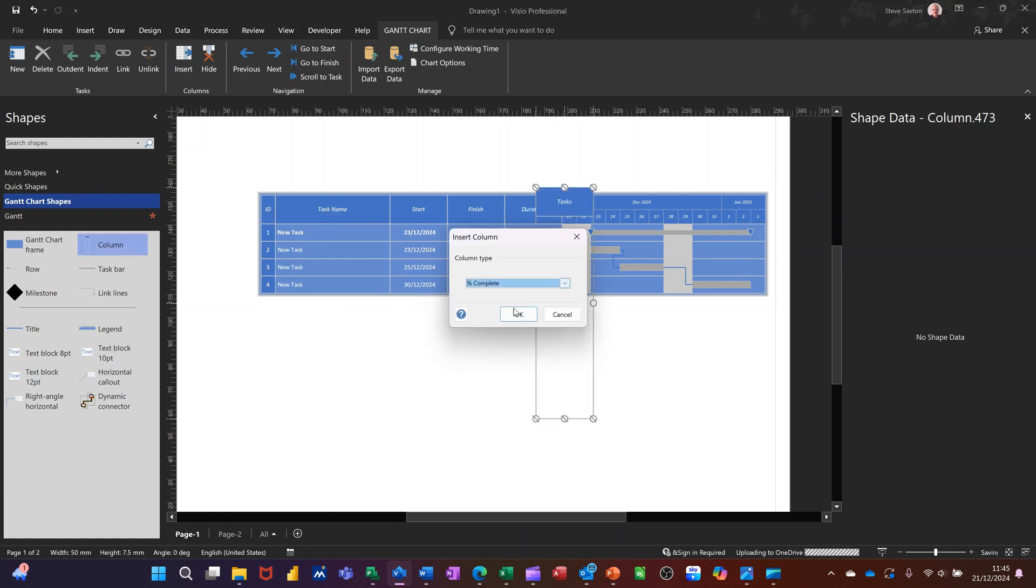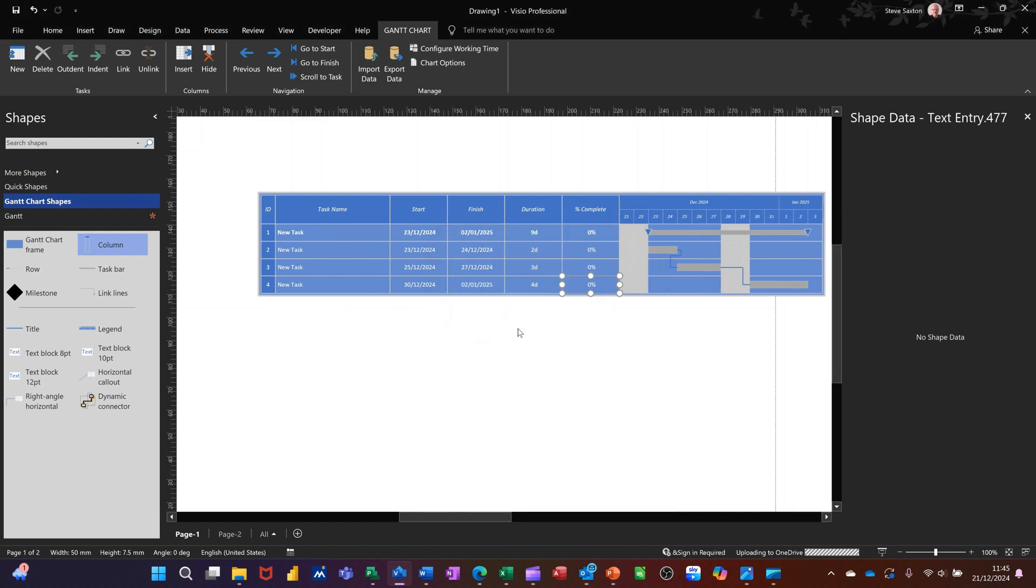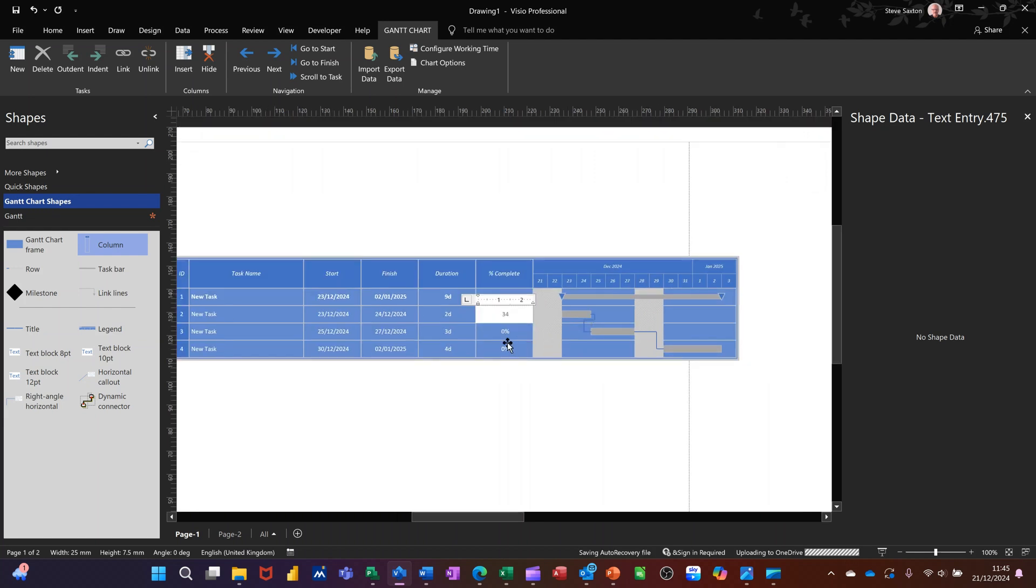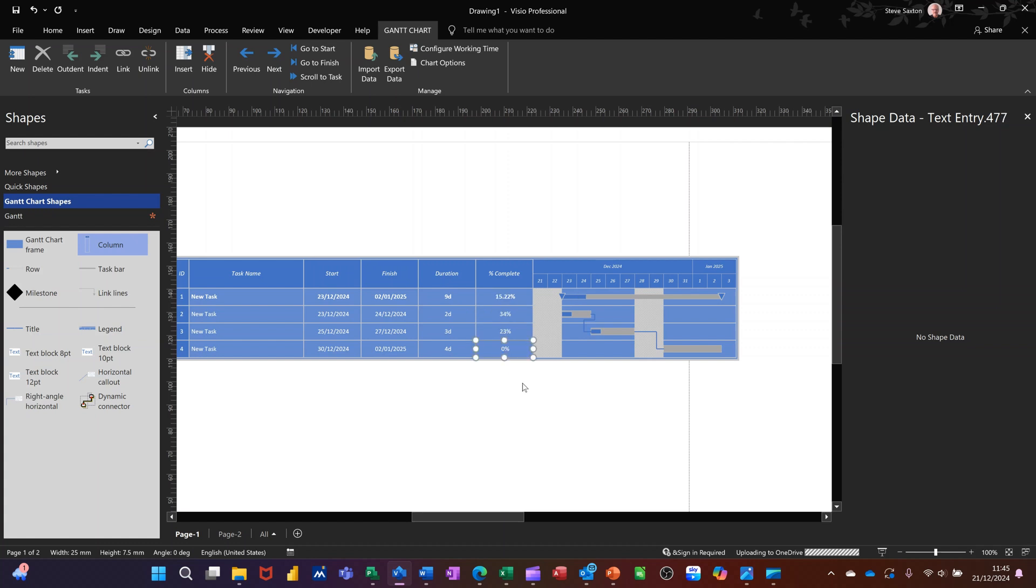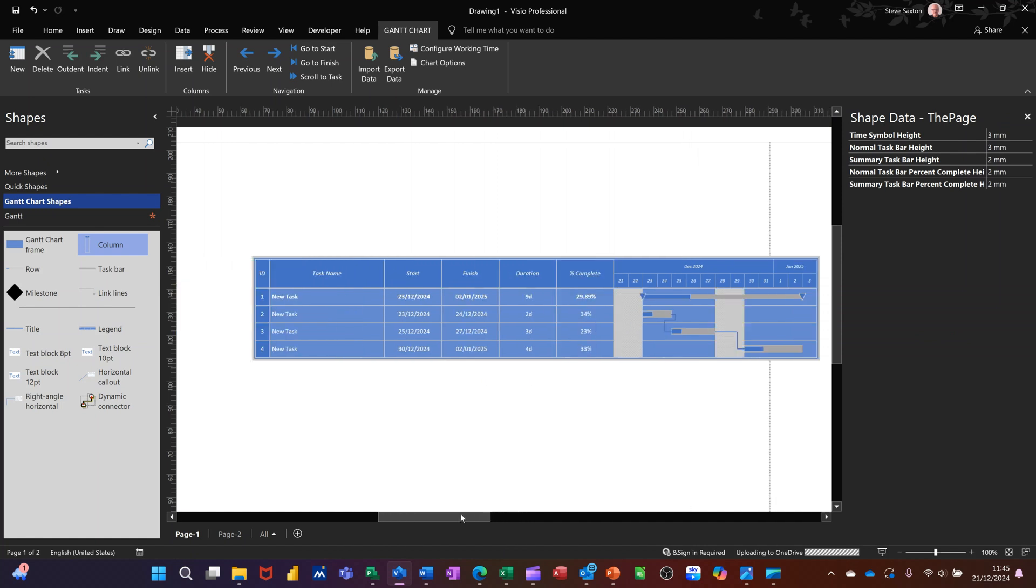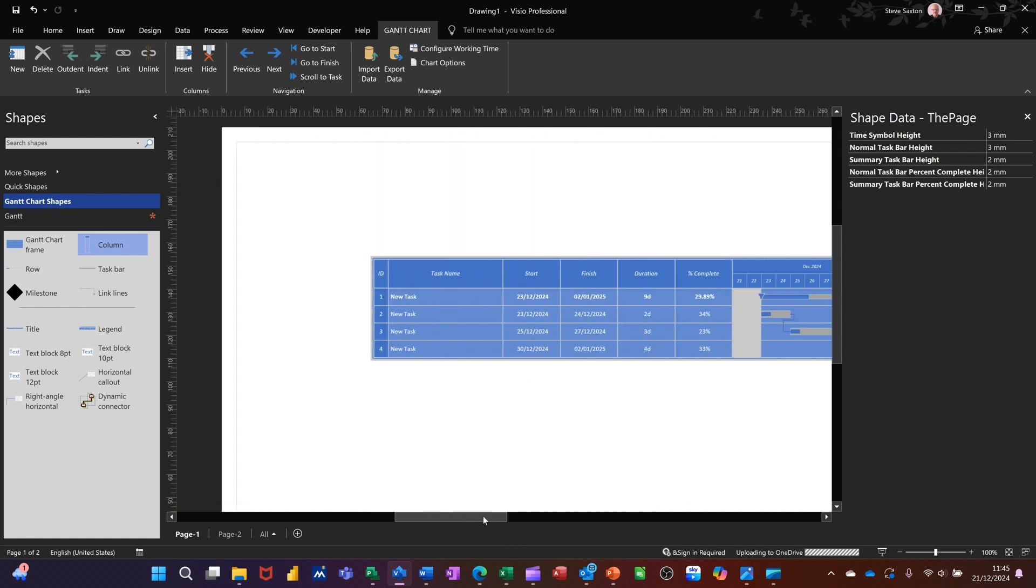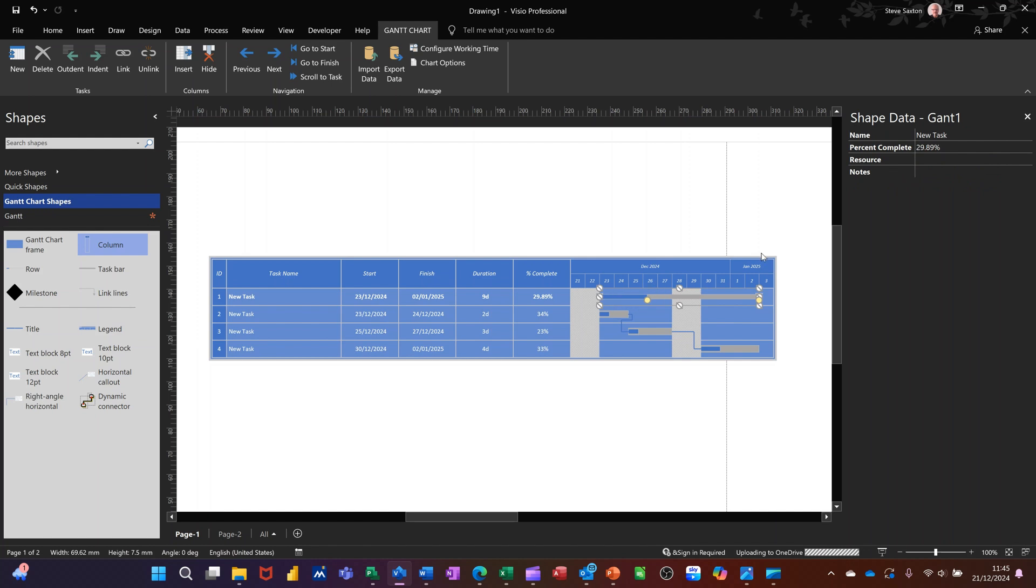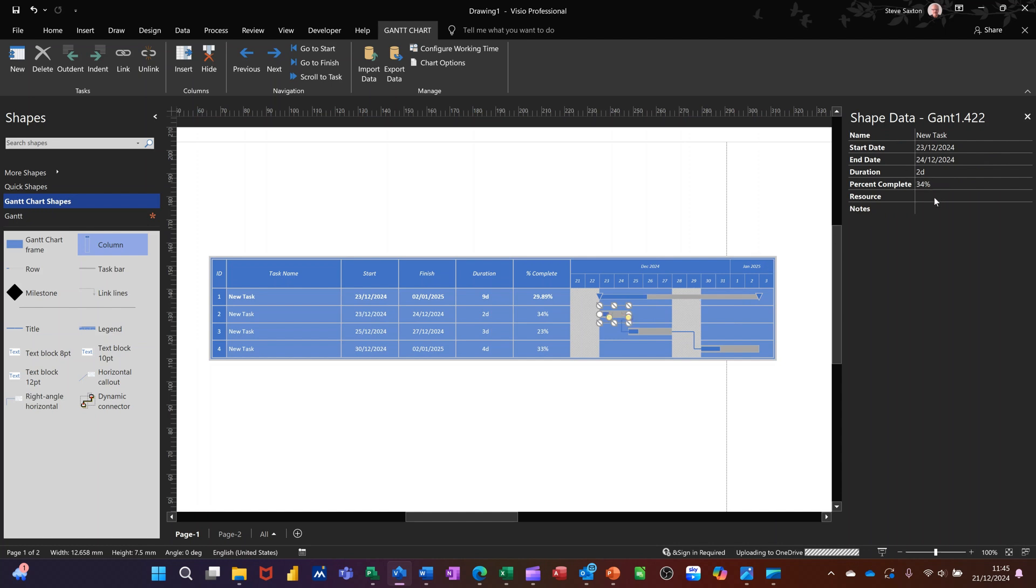And I won't touch the top one because that's now an overarching one, but I'll just start putting some figures in the bottom three and you can see how that works there. So the top one is now clocking up the percentage complete for this project. And if I click on that one it's saying 29 percent. And if I click on each one of these down the bottom there, whatever percentage I've done there it's saying that there.